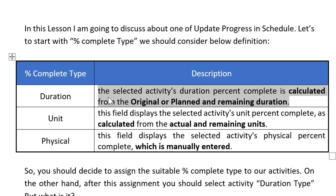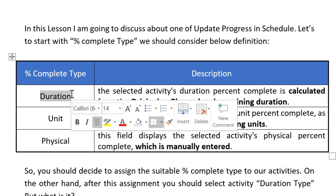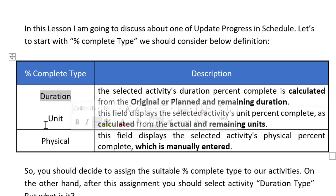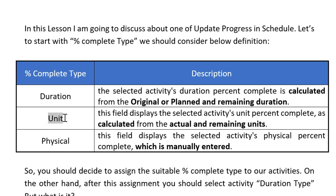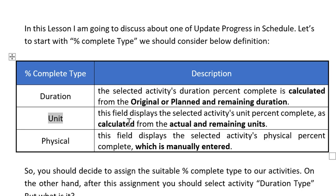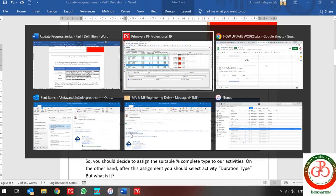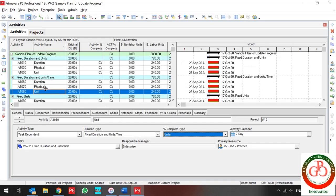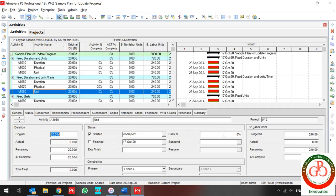If you want your activity to be updated by duration, you can select the Duration percent complete type. In this activity, duration drives all other things. But if you want to select the Unit percent complete type, it means that you want to calculate from actual and remaining unit.